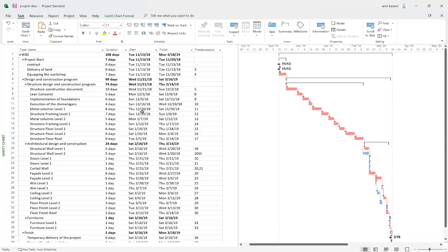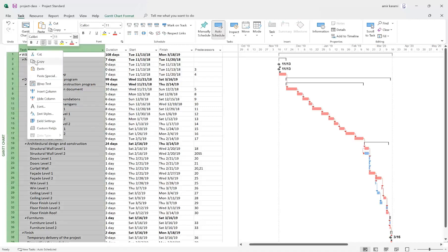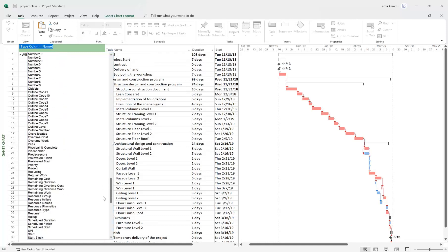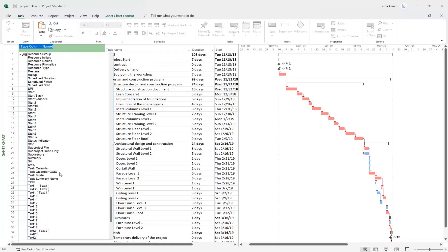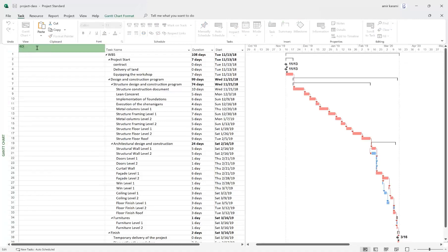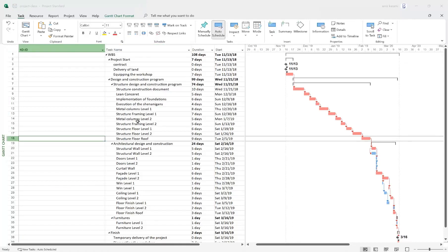In order to make it 4D, we should add two columns. For the first column, in each of these tasks you must assign an ID — a code. We have an equivalent for this in Revit. So I right-click here and add a column. In order to have an exclusive column you may use Text 1. Let's rename this column to 'ID'.